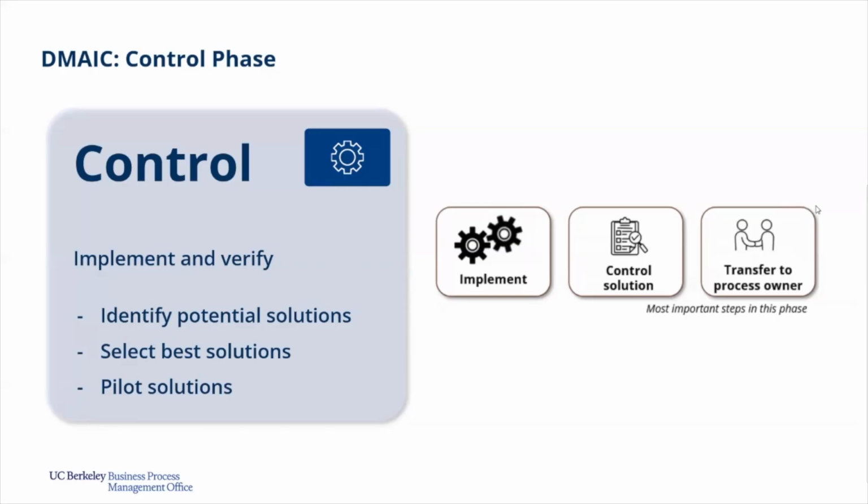One of the things you heard in our panel discussion earlier is also a very important part of whether you're doing project management or this kind of process improvement. You have a change state where potentially the process owner isn't necessarily the one driving the project or the work to make the change. In those cases, you have to make sure that as part of that work, you have a very clear transfer back to that process owner, so that when the project team walks away, the changes are sustained. That process will continue to perform well with the new state that you're trying to achieve.